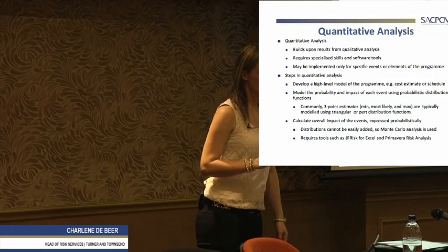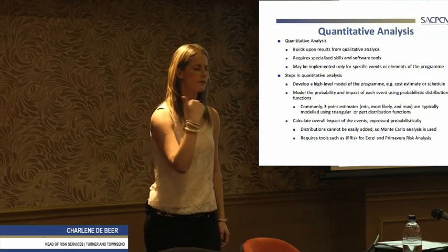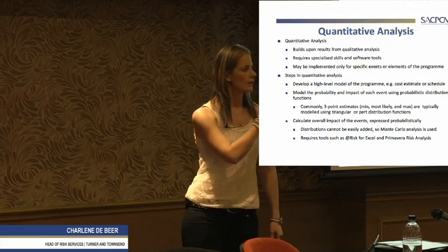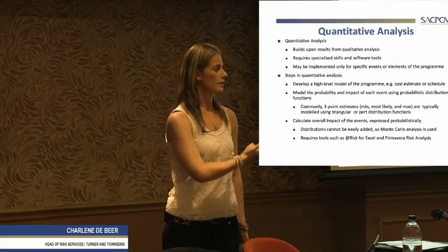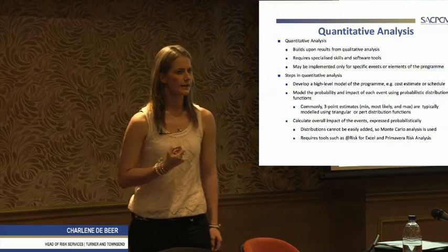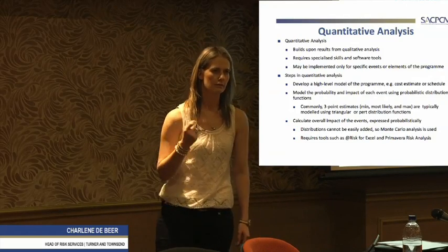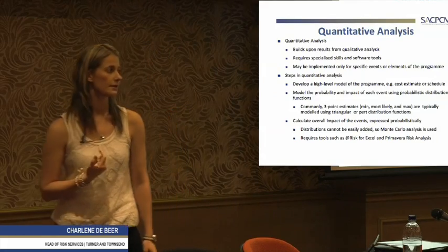And you can choose how you want to rank it. You can either show the priority risks by saying, what are the risks that will pose the biggest threat to schedule? Or what are the risks that will pose the biggest threat to cost? Because it's not always the case that the one that's going to cost you most in time will cost you most in monetary value, and vice versa. And we need to understand that as well.